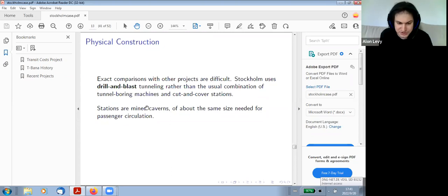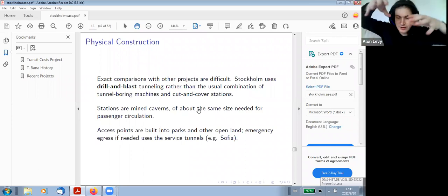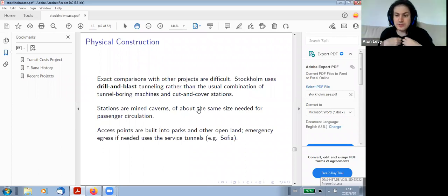Now again, just on the engineering level, the stations are also mined. This does increase cost. Again, just because I'm using another Nordic example constantly, Fornebubanen is also mined, and I was told that this is one of the reasons it's so expensive. Whereas typically you would expect cut and cover stations. So maybe it's not purely optimized. But for example, the entry holes might be a little bit of cut and cover, and then beneath the cut and cover hole, you would mine the rest of the station.